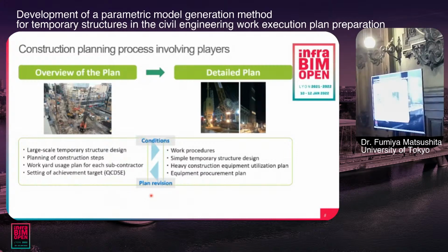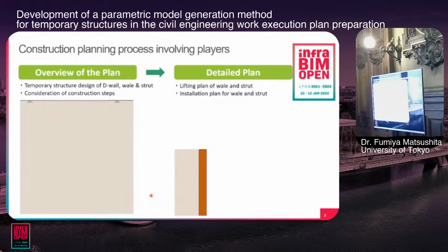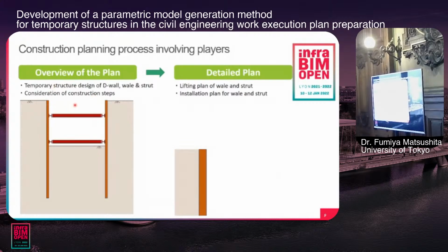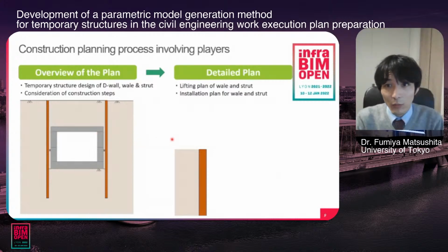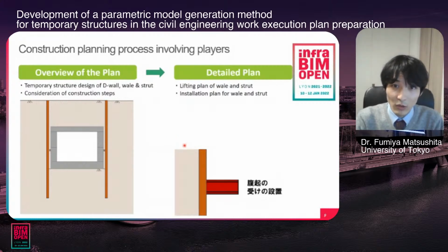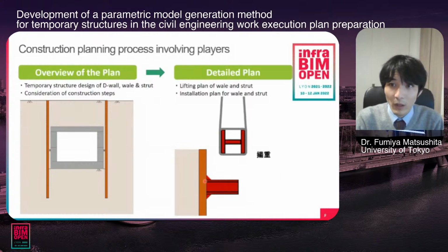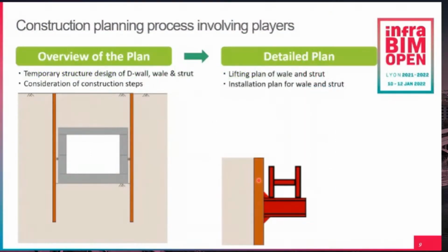Let me show the detailed plan. For example, the overview of the plan includes temporary structure design of the wall and strut, and consideration of the construction step. Also, the detailed plan includes installation plan for wall and strut, and lifting plan for wall and strut, like this.